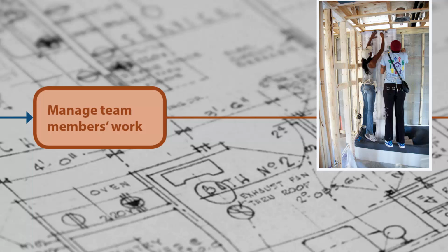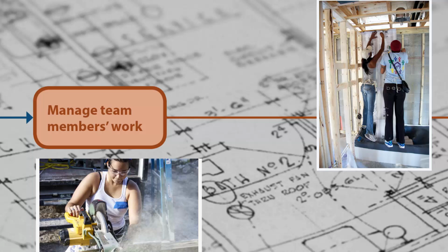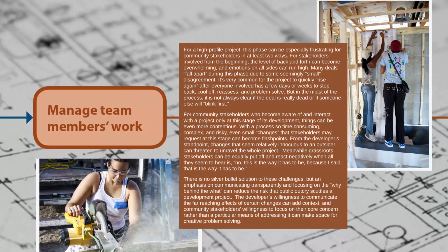In general, the developer's role is to hold the contracted professionals accountable for producing their contributions to the overall effort, and for choreographing the complicated dance between all the different channels and outside parties that must converge for a closing to take place. Throughout this phase, the developer will be negotiating, usually in multiple rounds, seeking to reconcile different expectations from different parties to the overall effort. This can include not just the funding sources involved, but also ensuring that the design team incorporates last-minute changes, requested, for example, by the Planning Commission, and that those same changes are then communicated to the contractor and reflected in the pricing.